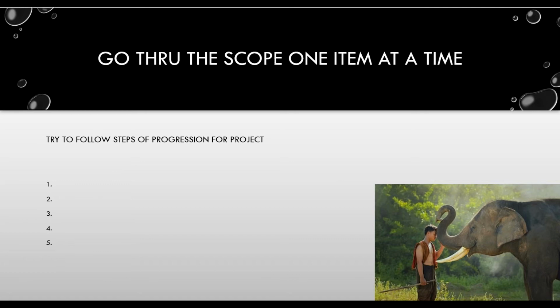If you want to do that, you can back up and let's say you may need to pull baseboards on the second or third day to drill some holes in the wall after asbestos testing comes back, et cetera, et cetera. So this scope does not all have to be done on the first day. I've seen a lot of people lose a lot of jobs by trying to go in and scope and price the entire mitigation project before they get started. And you've got a customer over here pulling their hair out, wanting to see something get started, and you're trying to get the paperwork done.